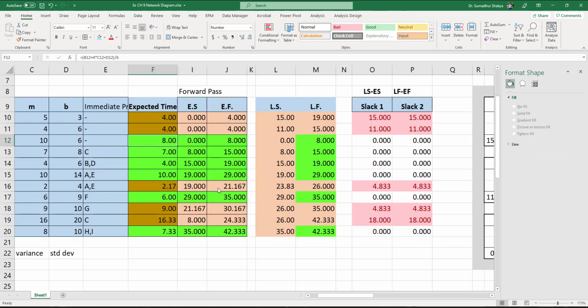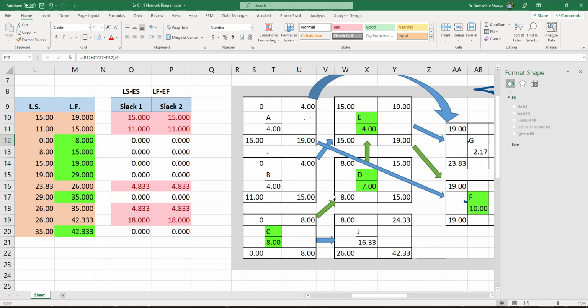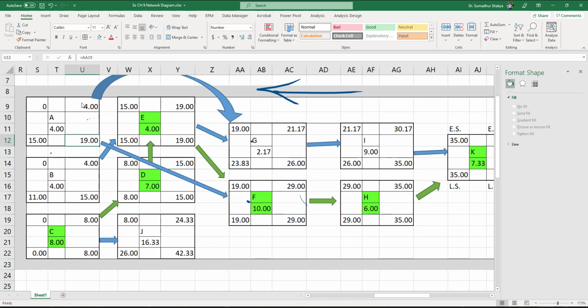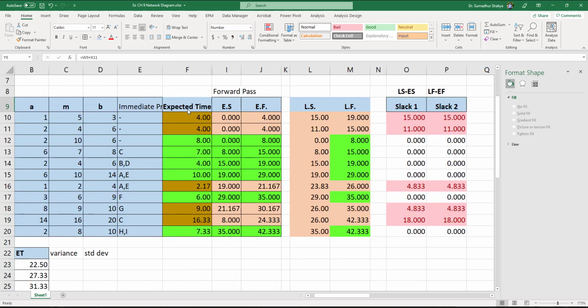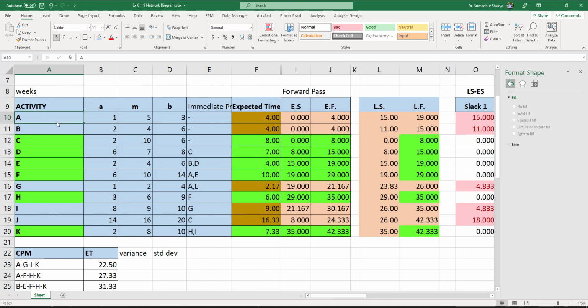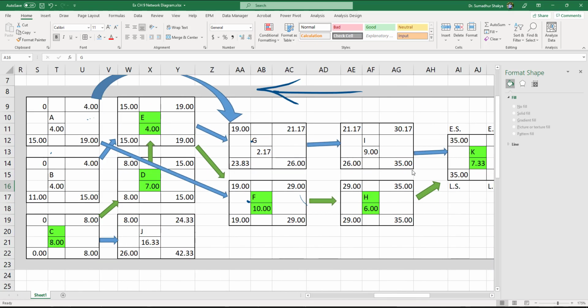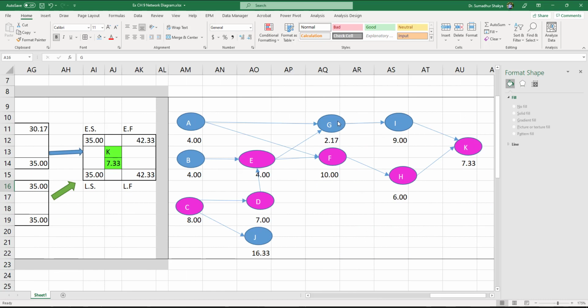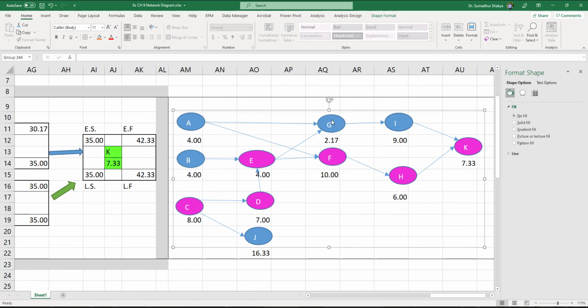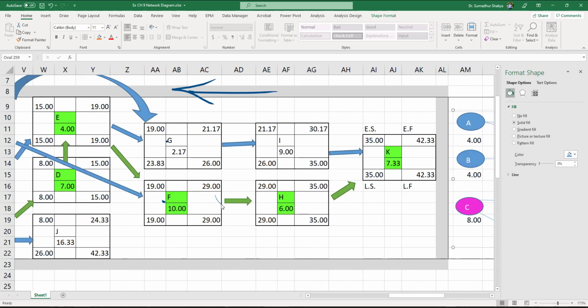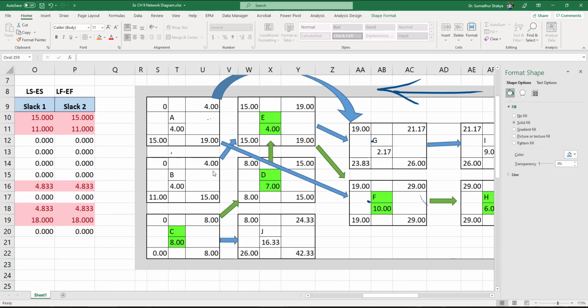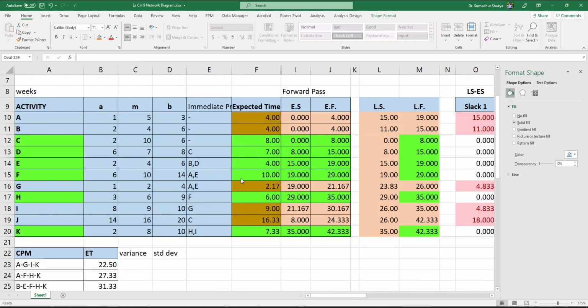If you do have access to Microsoft Project or Smartsheets and so on, or other project management software, some of these numbers you may never have to calculate by yourself. Instead of calculating early start and early finish time, you may be allocating these activities to either personnel or in terms of cost or in terms of dates. For example, a new deadline might come up wherein activity G has to be finished by a certain time frame in the future. So instead of starting from scratch from left to right, you will only right click activity G and say that this activity has to be finished by a certain date. And hence, because there are so many moving numbers, none of these calculations are difficult to calculate. But because they are sequential and dependent on the activities before and after them, having access to project management software does help our life big time.